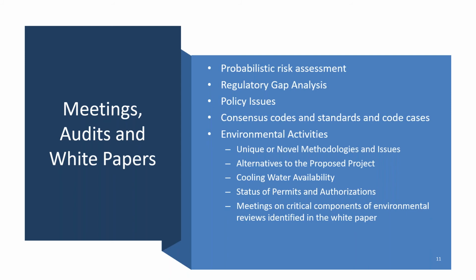During the pre-application stage, the prospective applicants should also use white papers to identify any consensus standards and/or code cases that you intend to use, and specifically, maybe to some extent more important, identify any standards or code cases that have not been endorsed or previously accepted by the staff.